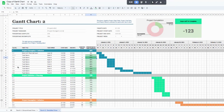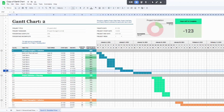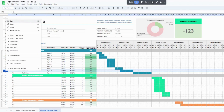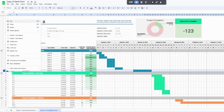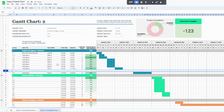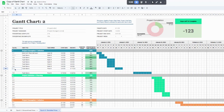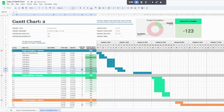Adding and deleting rows functions the exact same way as I showed you on the streamlined view. To delete a row, come in to the middle, select it, and click 'Delete row.' To add a task, select the last task in your project phase, right-click, and choose 'Insert one row above.' Then highlight everything in the row above the one you just inserted, copy it down using the same drag functionality, and that copies the formulas and activates the Gantt chart.